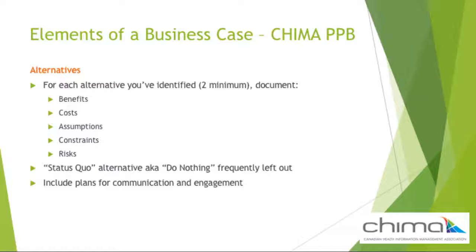At this stage, you need to identify risks which will exceed the threshold as set by the organization. There may be different risks associated with each alternative. As well, you should examine the risk involved with not doing the project.